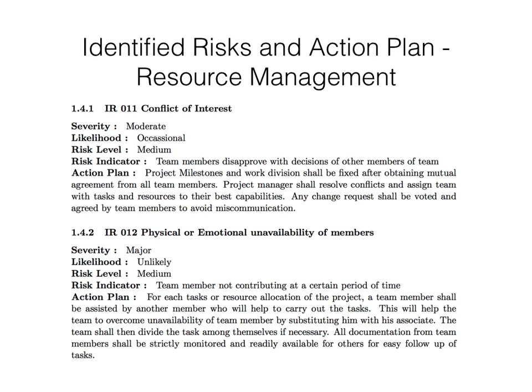This buddy system will help the two team members to understand one task, and if the other team member is unavailable, his buddy can take over. To make this happen, all documentation for the task that is cleared by the team member should be clearly backed up. This will allow a smooth handover from one team member to another.